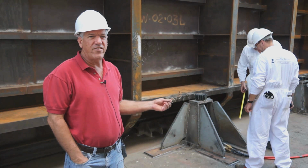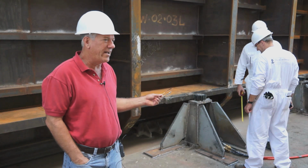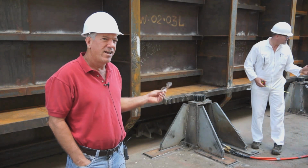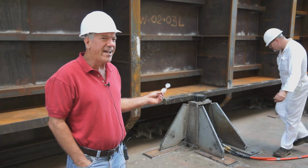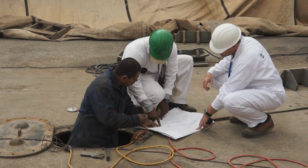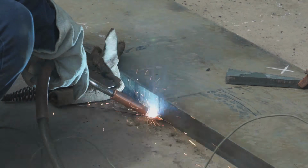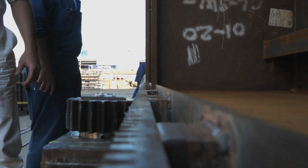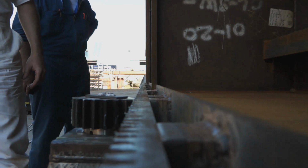Okay, so yesterday the gear jumped out of the rack, and so we felt we had a problem. We looked at it, and the deck is flexing below the foundation. So last night they put in some reinforcements, and about 4 o'clock in the morning they tested the drive system again, and it's all working well. So we're looking good.